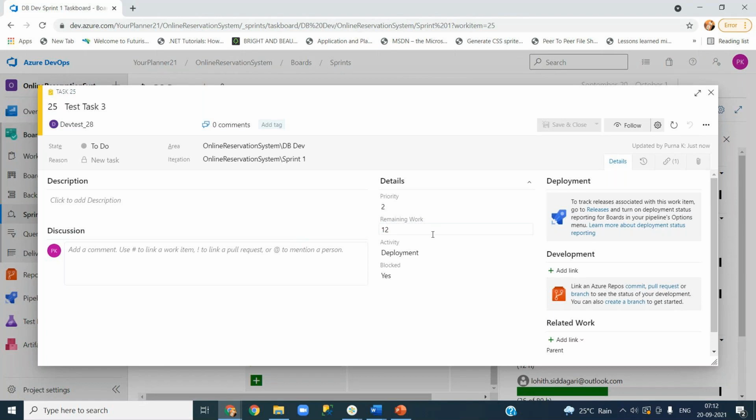No, no, no. This is by design. Whatever details you see here are based on the Scrum methodology. The tool was not developed on its own; it is developed on the Scrum methodology. So in Scrum or Agile methodology, what people need to do? Actually, our sprint is getting started today, if you remember, September 20. That is the start date we gave, right? End of this day, or tomorrow morning, whoever is assigned to work on this task has to reduce it by 8 hours.